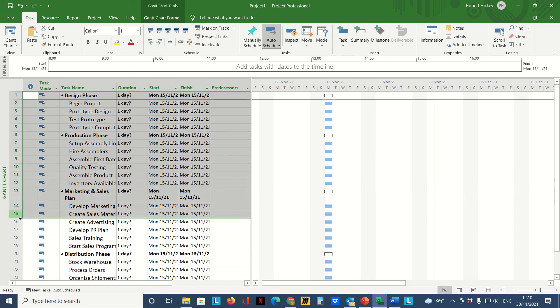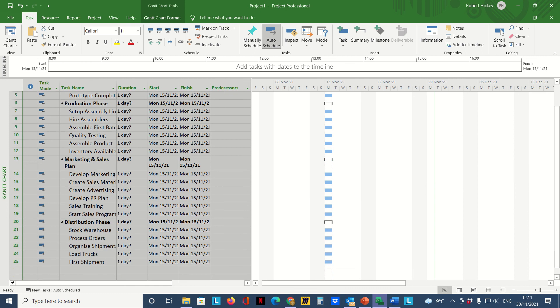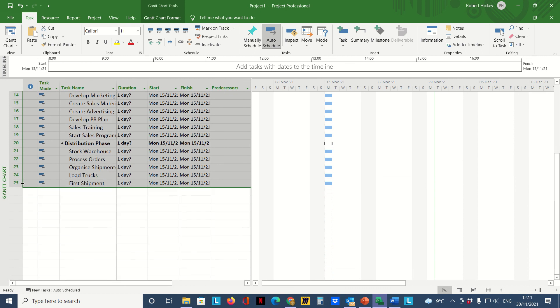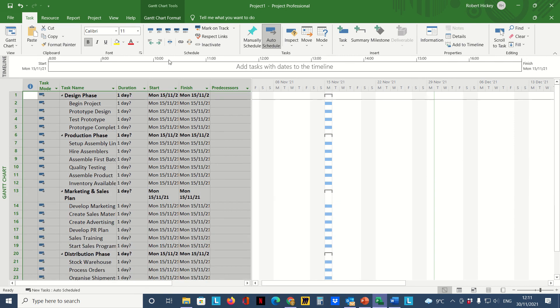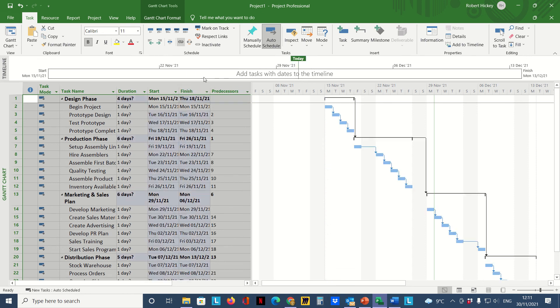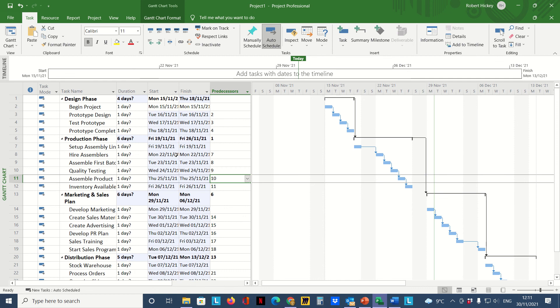I'm going to select all the rows for all the tasks, and then up on the Task tab in the Schedule group I'm going to click on Link. What that does is link all of these tasks together. Now we're assuming that none of these tasks can start until the previous one has been finished.